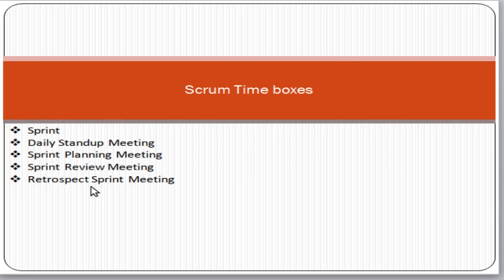See, just think of a sprint retrospective meeting as a lesson learned. Basically, lesson learned means that if something goes wrong, you have to avoid it. Also, you have to think about what are the reasons due to which things went wrong. Okay, so that if you can learn from it, you can avoid it in the future. Your future means the next sprint as well. If something goes well, you also have to learn from it, and discuss that these are the things which went well, so we have to repeat those things in the next sprint.